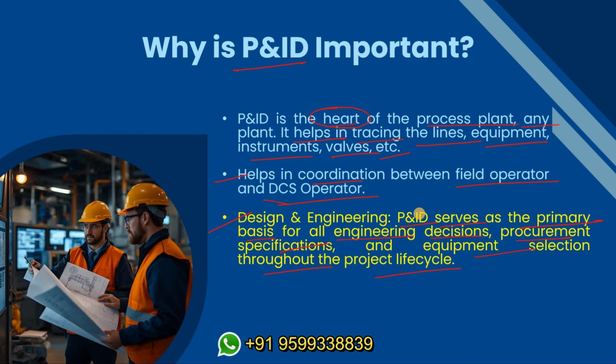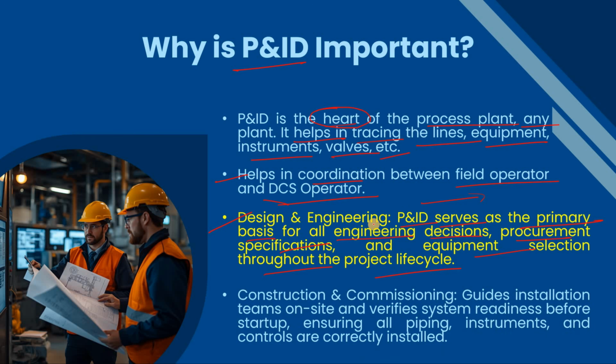See, when you issue the P&ID the first time, and after that when you revise the P&ID again and again, the other downstream disciplines also revise their deliverables again and again. So the importance of P&ID is very high for the other departments as well. I hope you are able to understand the importance of the P&ID. It plays a central role in the plant as well as in the design phase.